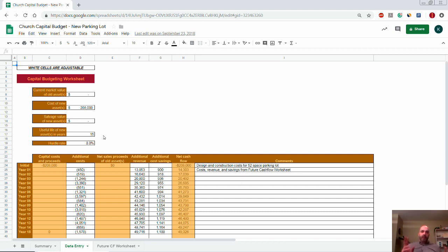So if you watch my generic capital budgeting video, you'll notice that the first thing we start with is talking about the old asset. Okay. So we look here, you'll notice that there's quite a few of those fields missing, and it's all mostly about the new asset. The current market value of the old asset is the only thing we're interested in terms of the old asset. So why is that? The old asset is considered in the generic capital budgeting worksheet in large part because of the effects of a gain or loss from selling the old asset. Okay, so the current market compared to the book value of the old asset.